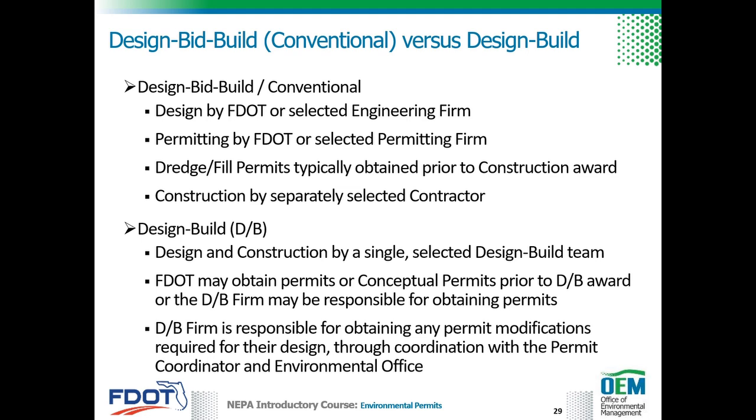On design build projects, conceptual or construction permits may be acquired by FDOT prior to letting, but may be modified by the design build team based on design changes proposed during the alternative technical concept process. Otherwise, the permitting effort is assigned as part of the design build team's scope of services. A project's contract letting date is the date the FDOT opens bid proposals from potential contractors.